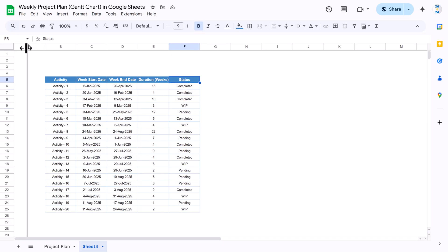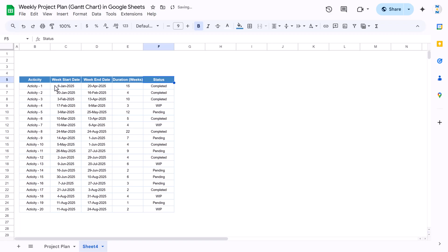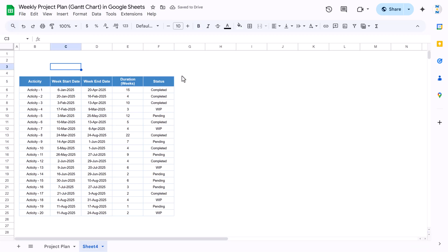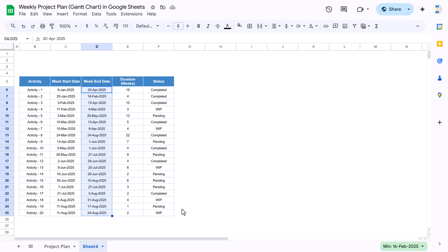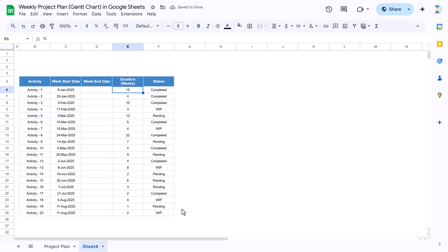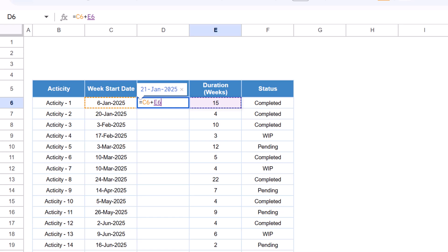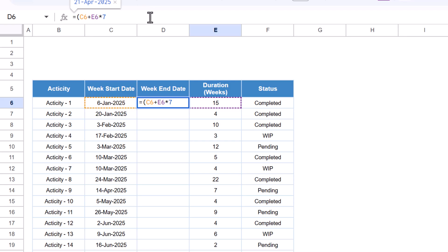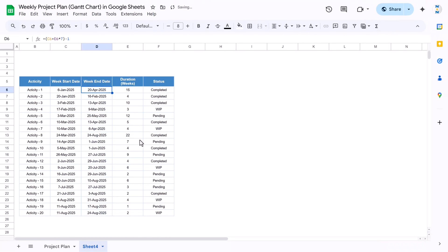Now we'll create the timeline. Make column A slightly smaller in height. Select the range, go to text wrapping, and wrap the text. Delete the existing end date because we want to make it dynamic. The formula will be: start date plus (number of weeks multiplied by 7), then minus 1 — because if the week starts from Monday it ends on Sunday. Fill this down. Now this end date calculates automatically when you change the duration.